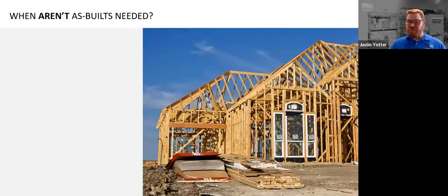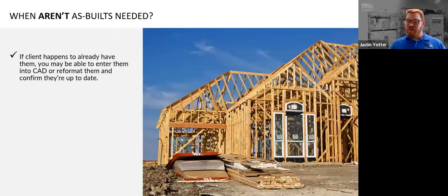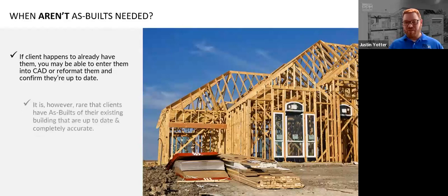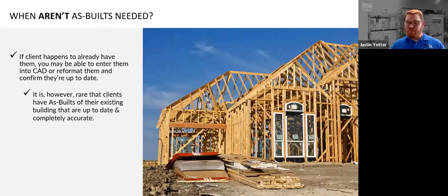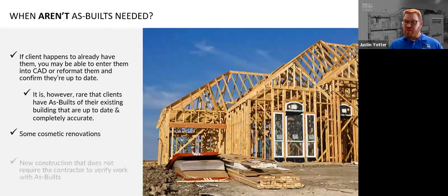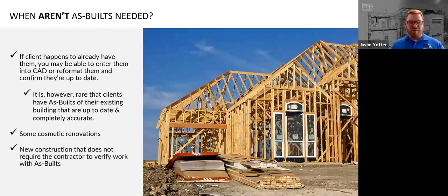So when aren't as-builts needed? It is rare that clients already have current as-builts of their existing building that are accurate, but it does happen. So in that case, of course, you would not need more before starting your project. There are also simple cosmetic projects that do not require having accurate as-built plans. And of course, if a building is being built from scratch, then all you'll need are the construction documents.